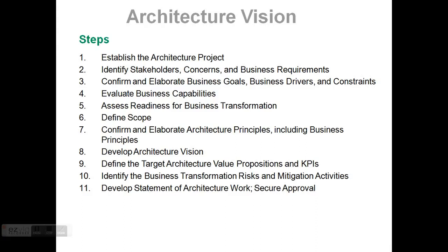There are 2 levels of risk that should be considered in step 10. First is the initial level of risk, which is the risk categorization prior to determining and implementing mitigation actions.